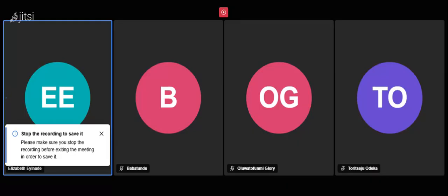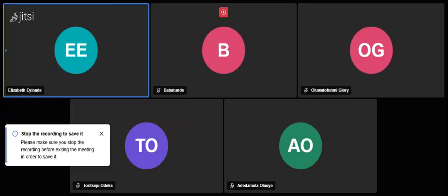So that's why a good backlog will be clear. It will have every piece of information, every requirement from stakeholders, that they will need in building that product. It's not like you tell your developers that you want to build send money, but you are yet to even gather requirements. You've not written your user story, you've not written your PRD, you don't have a design for it. How do you want them to proceed to build that kind of feature? So you have to give them everything they need before they can start production. Because if they start building blindly, it's going to be disastrous.